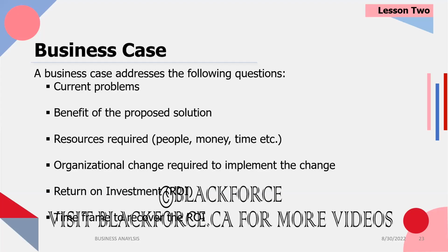Okay. And it also talks about the time frame to recover the money. It is not good enough that you're going to save me $12.5 million. If you're saving me that $12.5 million over 25 years, it is useless. I'm not interested in it. Okay, 25 years is a long time. Would that application even be relevant in 25 years, right? So it's very important to have the time frame for the ROI recovery, the return on investment recovery, and it needs to make sense.